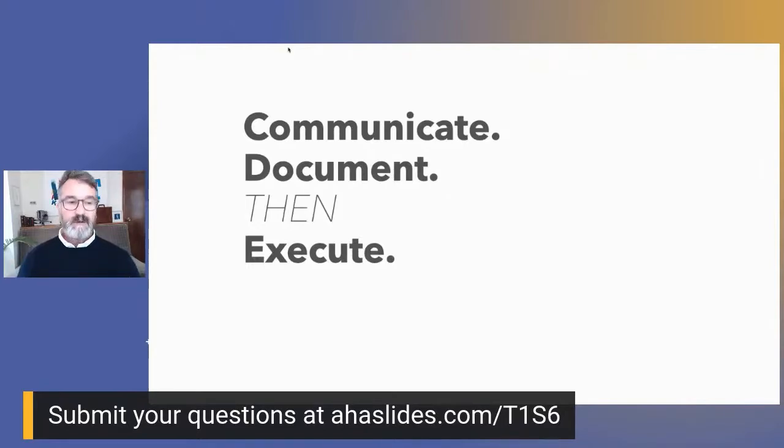And then when you do document the client decisions, you want to document that in a central repository so that it can't be modified or edited. Great examples of project management tools are Mavenlink, Wrike, Basecamp, Asana. Those tools allow you to continuously be updating your documentation as you go. You really need to do this. Communicate, document, then execute. Don't jump past the other points or you'll have a disaster.